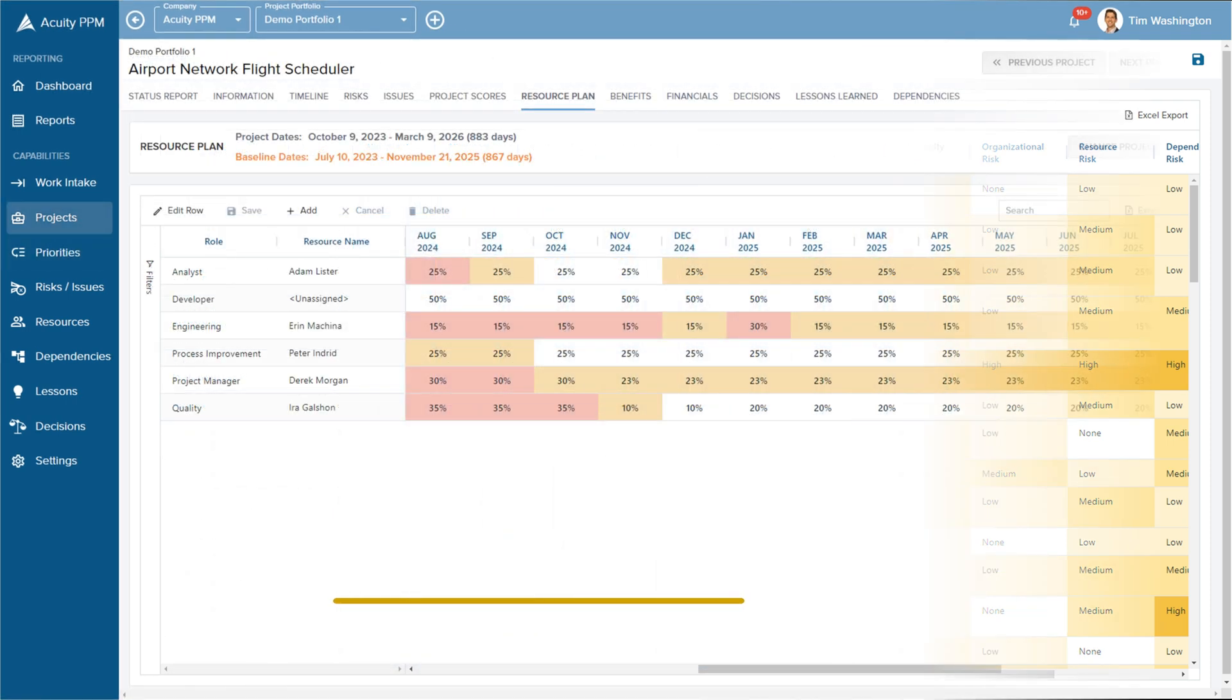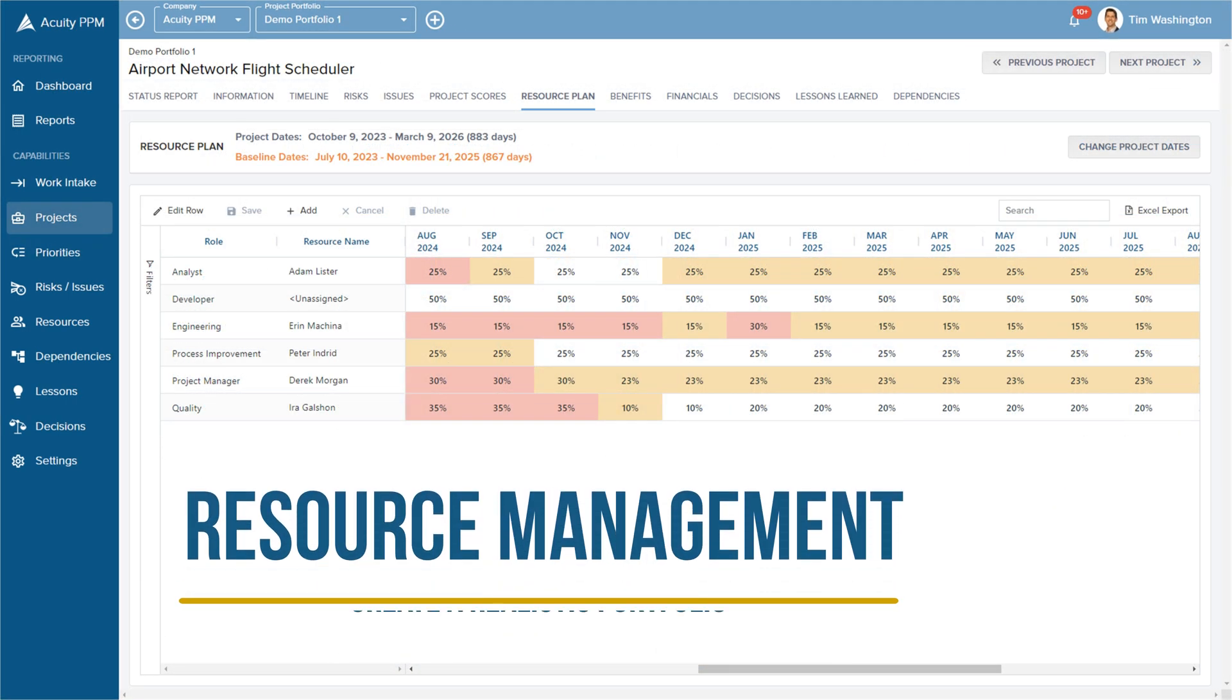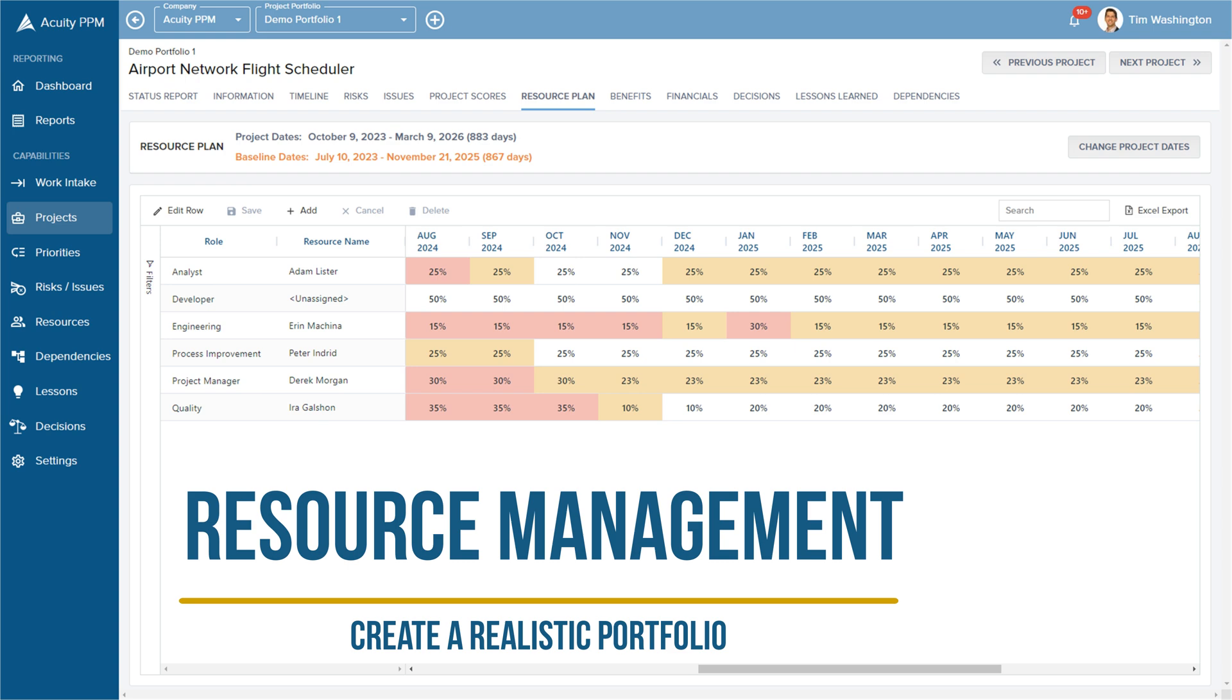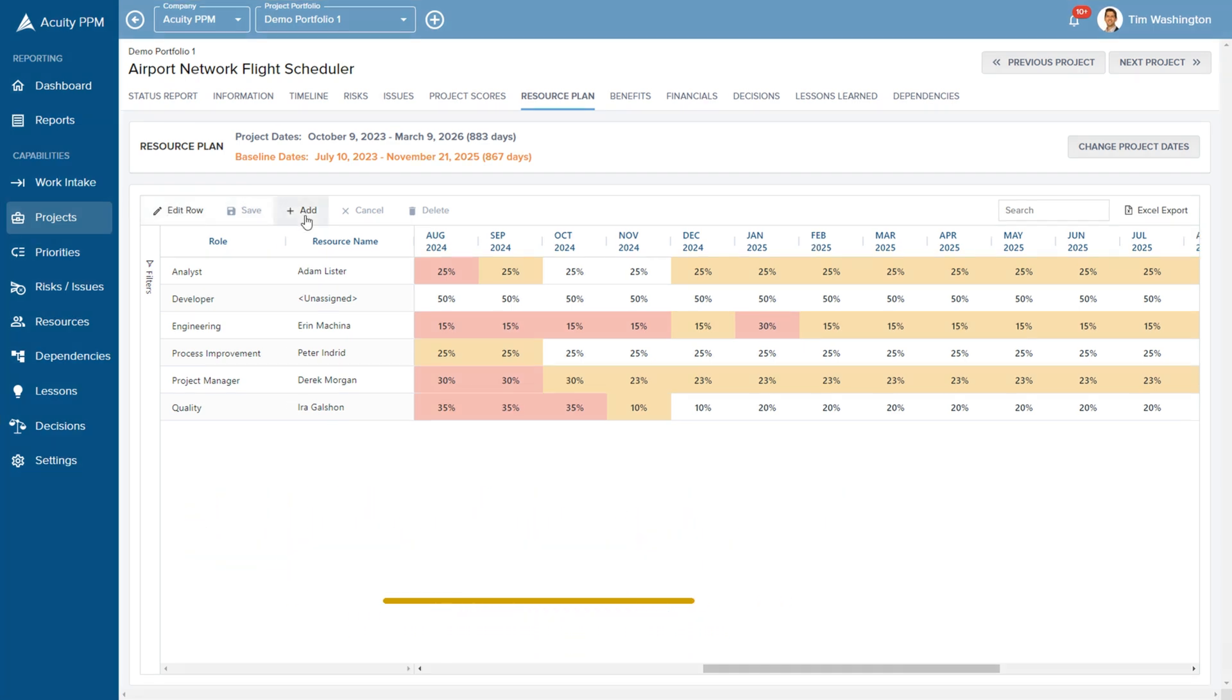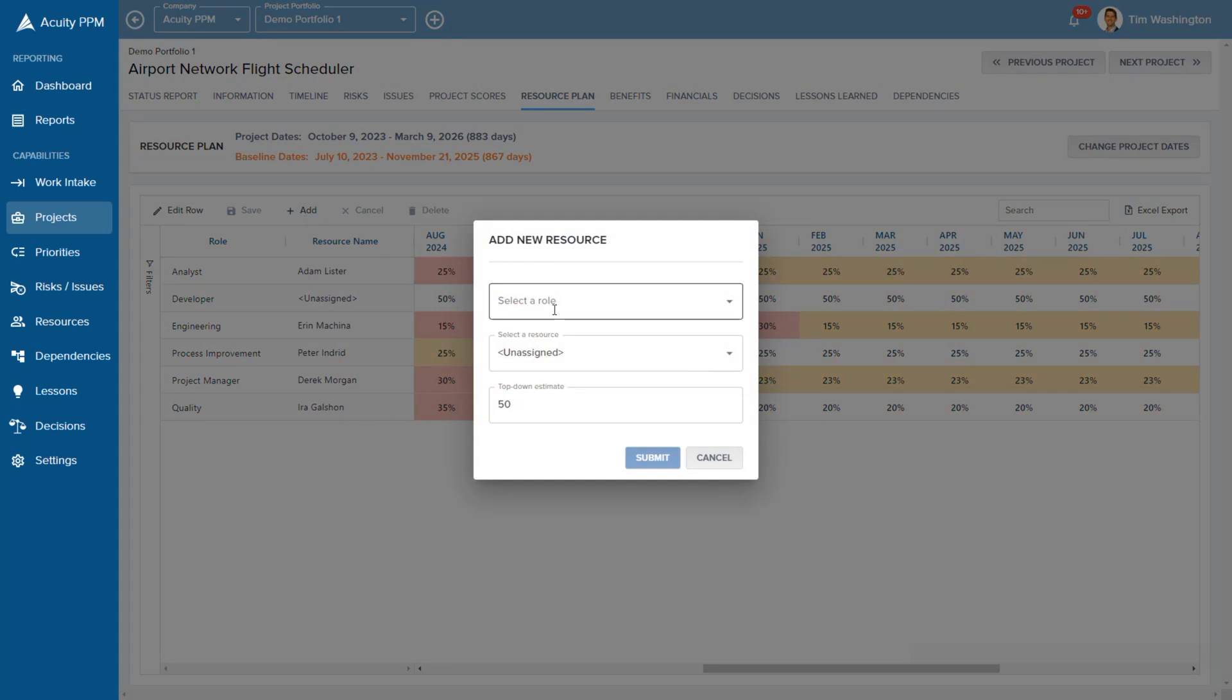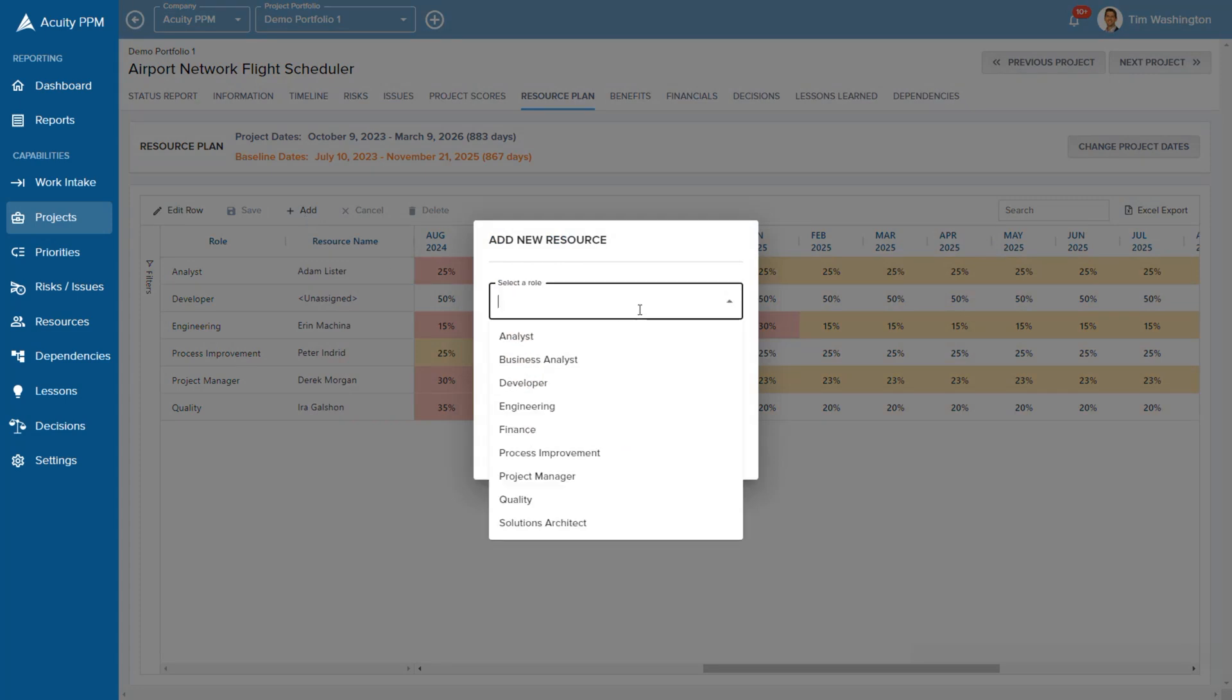Resource management is another pillar of project portfolio management, and we make it easy to create project resource plans to determine whether the project has adequate resources to be completed on time.